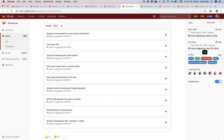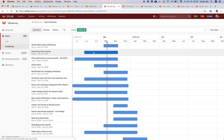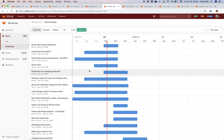What that does is amazing: it looks at all the milestones assigned to the nine issues in this epic, finds the one with the earliest start date — September 8th, which is milestone 11.4 — and uses that as the epic's start date. Analogously, the latest date is November 22nd. So this epic transformed from a top-down planned future initiative into one that dynamically reflects what work is actually scheduled. This is your single source of truth — you don't need separate tools for portfolio planning and issue tracking.